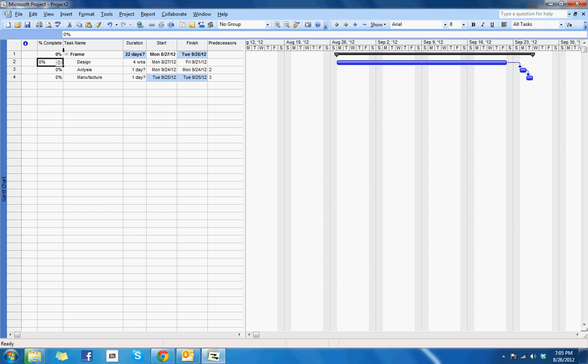So by adding that now, I'm hoping that every maybe weekly meeting I can just go through the leads, what tasks that they're currently working on, and hopefully updating the % complete that day, so every Friday. And so say we put in 65% done, and if you look at the Gantt chart, it'll have a line through it that reflects that 65% done. That'll just make life a little easier on knowing where we are in certain different tasks.